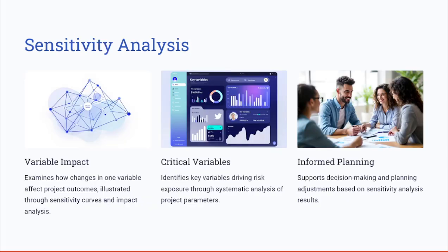Sensitivity analysis. Sensitivity analysis focuses on understanding how changes in individual variables impact the overall project performance. By varying one input at a time while keeping others constant, this analysis identifies the most critical variables that drive the risk exposure.